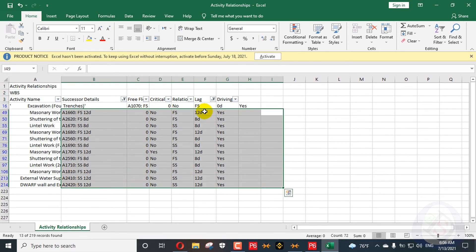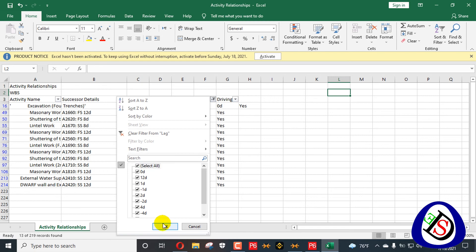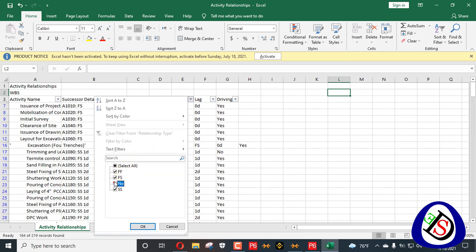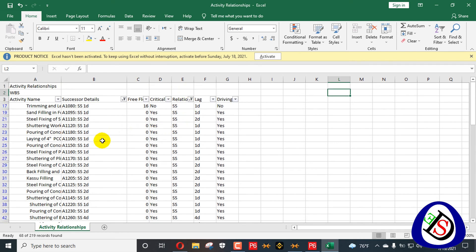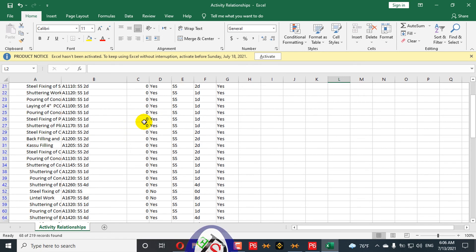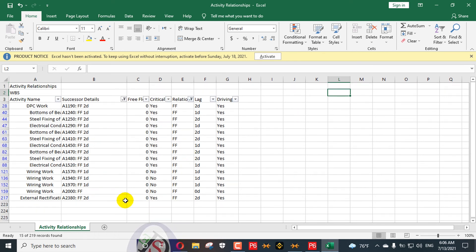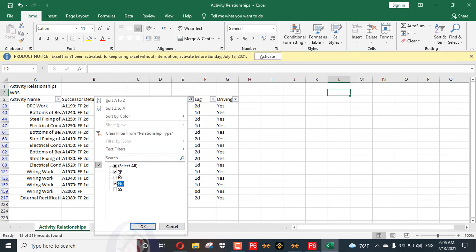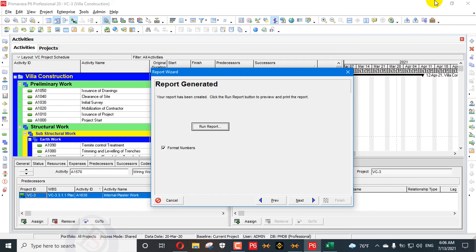Now I will talk about relationship types. Activities having a start-to-start relationship or no relationship — you can find these activities here. These start-to-start activities with no valid finish relationship are dangling logic activities. You need to assign finish-to-start or finish-to-finish relationships. This activity is a finish dangling, and these activities are completely dangling.